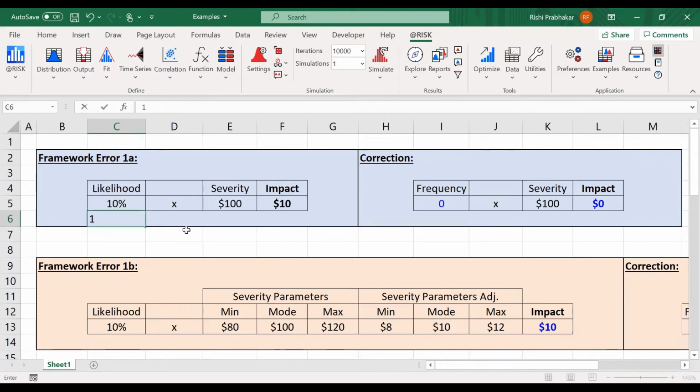Another trick about this is, what if I have an event that I think is 1% likely, but it might cost $1,000? Well, of course, if I multiply that, I get $10 again. So as a framework, an item that could cost me $100 is given the same risked value, allegedly, as something that could cost 1,000. I know it's less likely, but if I look at the impact to my business, I definitely don't think these two things are the same.